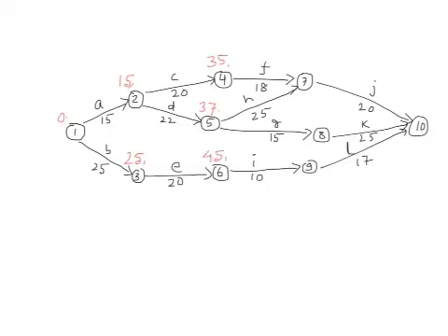For node 7 we have two activities ending here. So 35 plus 18, that gives us 53, and 37 plus 25, that gives us 62.